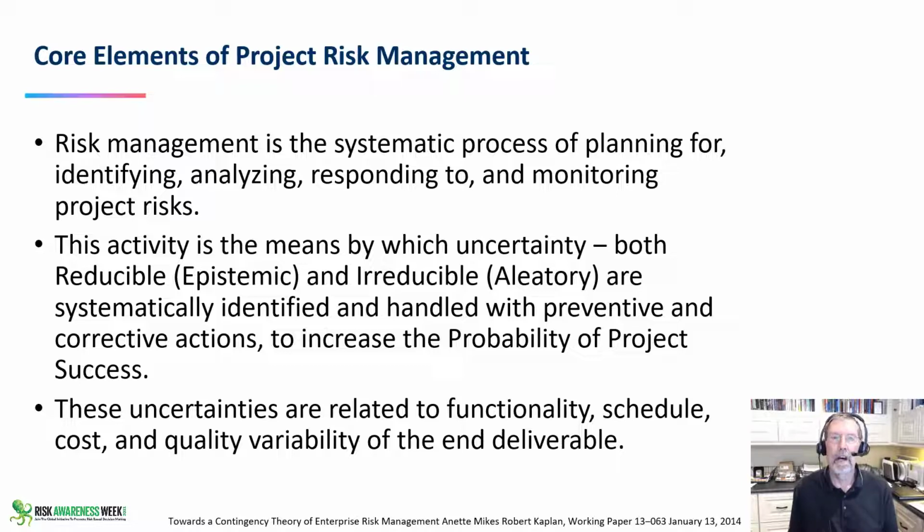Epistemology is the study of knowledge, and the other type that's on projects is aleatory. Alea is a single die, 6 sides, that the Greeks used to gamble, and this aleatory uncertainty is natural variance. The weather is aleatory. The productivity of human beings doing their work is aleatory. It's a random process. It's never exactly the same. So those are the two sources of risk that happen on projects, and we'll learn in this workshop how to handle them. And there's a third type, ontological, which is unknown unknowables, and that's always plan B. So we won't talk about those. Those will be something different here.